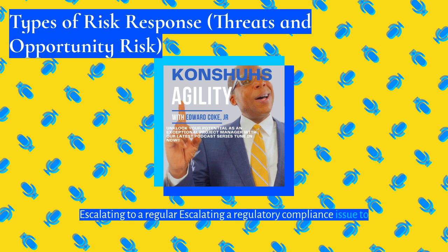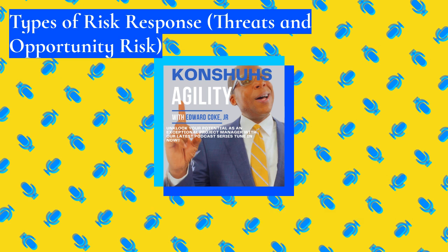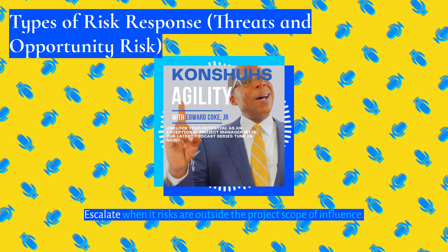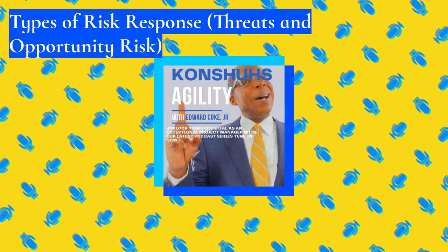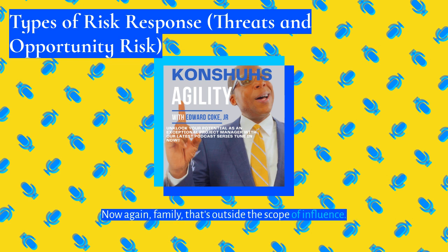Escalating a regulatory compliance issue to executive management if it requires a significant decision making beyond project authority. Here's my professional advice. Escalate when risks are outside the project's scope of influence. Now, again, family, that's outside the scope of influence.